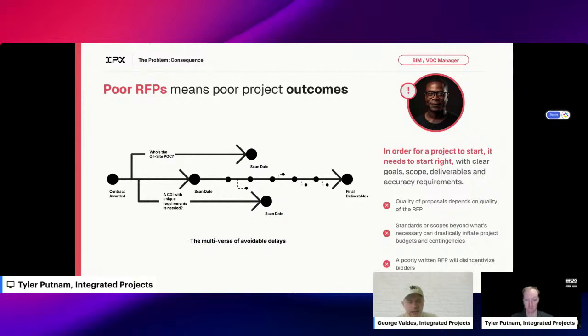And so what that means is that things that weren't captured in the RFI process or in that cycle could actually end up delaying the services side immensely. And there are some key ones that we've found, a lot of this is through our own trials and tribulations in some sense of what we're sharing. But simple questions like, who is the on-site POC, right? Or is there an on-site POC? Or just even explaining further what the expectations being set after the fact are? All that prior information up front helps everyone that you're trying to work with provide better answers and hopefully lead to less delay.